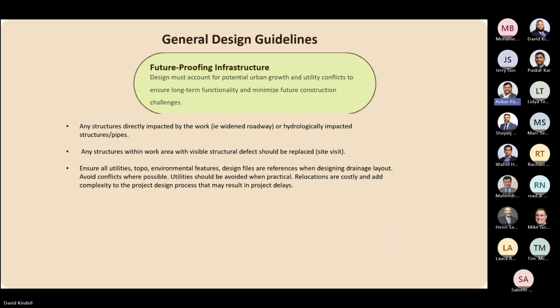So just be a little bit careful and don't just start analyzing the whole corridor of a long PSAP project or something, because once we start putting calculations, we have to own them. We have to make sure they're carried through to the final design, and it ends up becoming a big effort that may or may not have been included in our original scope.